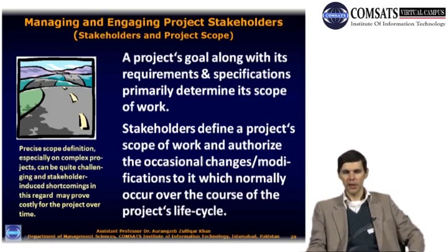And if this is not done properly, it can have very serious negative repercussions for the project. If the scope has not been managed properly, it can result, for instance, in a massive cost overrun and also in a schedule overrun for the project.